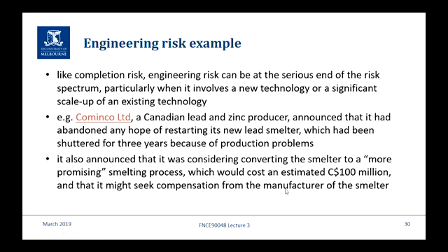I mean, these guys messed us up 3 years ago. If we could sue them, we would have sued them 3 years ago. Or 2 years and 9 months ago, after our lawyers went through everything and ripped them to shreds. Clearly, the week after it happened, the lawyers came in and said, hate to say this, but your contract doesn't cover this. So this was a legal risk as well as an engineering risk.